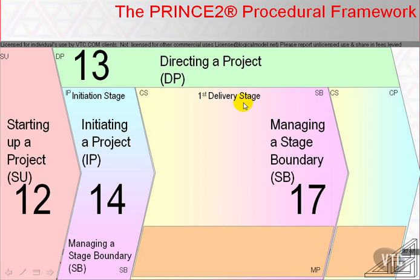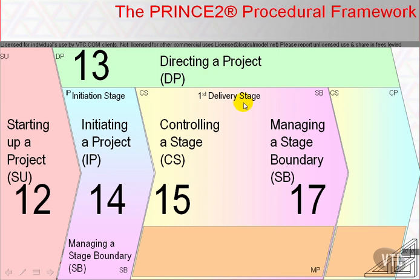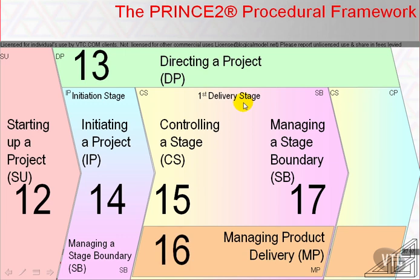So-called specialist delivery stages are named because they deliver the technical or specialist outputs of our subject matter expert team members. During a specialist delivery stage, the project manager follows the guidance of controlling a stage — chapter 15 in the official manual — which describes, amongst other things, how to delegate technical work packages to the specialists who create the project's products. These team members and team managers perform their discipline-specific activities such as welding, graphic design, bricklaying, or software testing, as well as three PRINCE2 activities within the managing product delivery process. The dialogue between the project manager and team members maintains control over the allocation of work and the reporting of achievement.